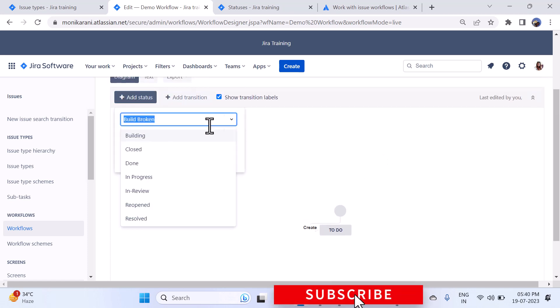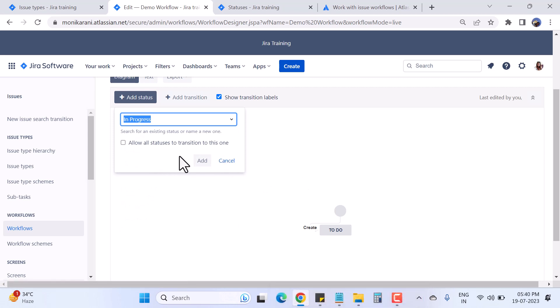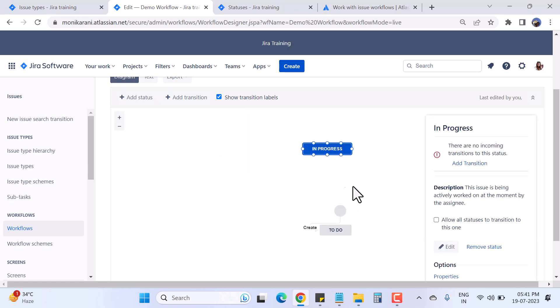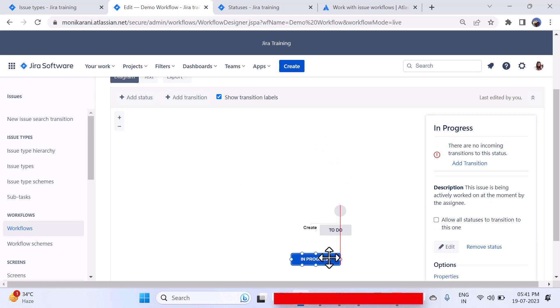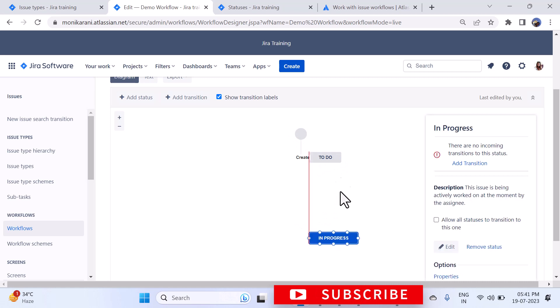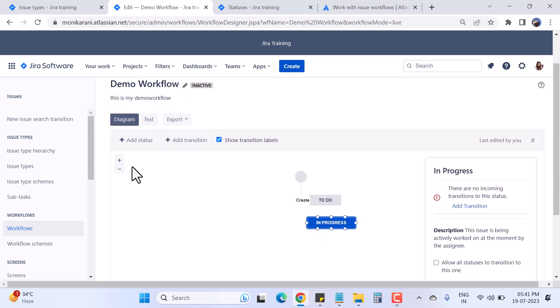Now I want to add the status In Progress. Before clicking Add, there's an option that says 'Allow all statuses to transition to this one.' This means your issue can go from anywhere in the workflow to this status if you tick that checkbox. I won't do that now, so I'll just click Add, and the In Progress status has been added to the workflow.